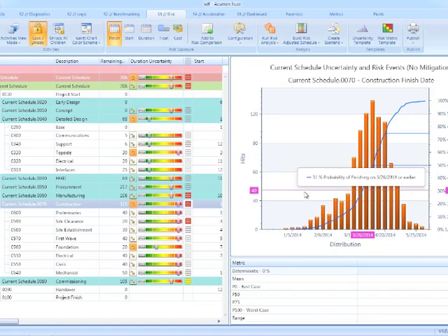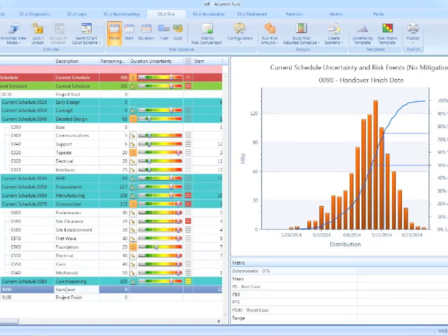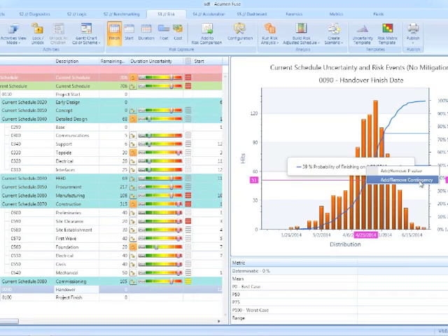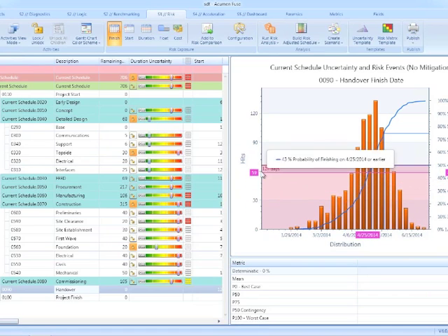And again, now let's go to, say, project handover. Earlier we touched on being able to report contingency. So in our example project here, handover is scheduled for the 26th of December. Our P50, though, isn't until the 29th of April the following year. Our P50 contingency, boom, 124 days. So we have a 50% chance that our project is going to be 124 days later than planned.